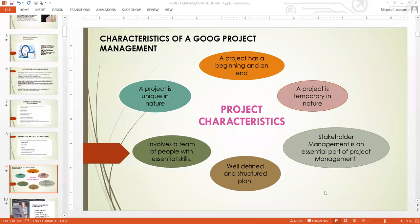When you understand your stakeholders, the next thing is to have a defined project structure — the project plan. Even if you're not coming up with a definitive project plan, you need a preliminary project plan in the form of a work breakdown structure. Once you break your project down using a work breakdown structure, you will see your project taking shape. If you are not applying breakdown structure as a project manager, you are a cowboy in project management.